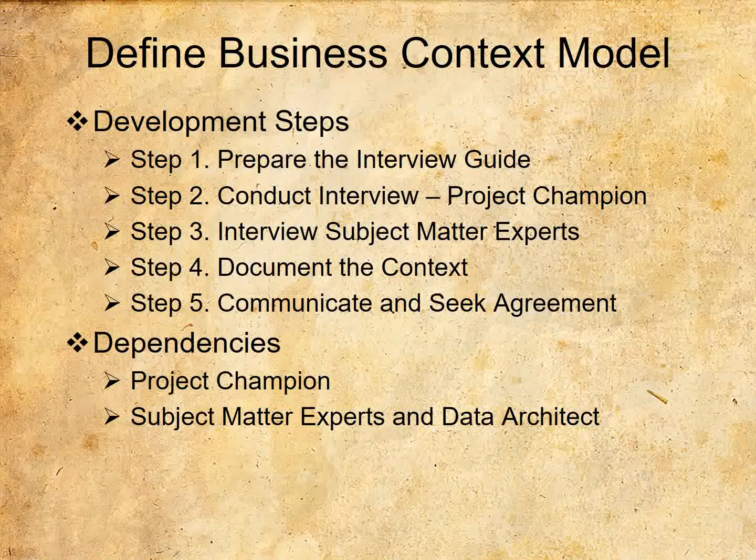Interview subject matter experts. Complete data collection for the systems and data inputs and outputs by interviewing the data architect. Also, complete interviews with subject matter experts to clarify and confirm the context diagram. Document the context. Use the template to document all the elements of the context diagram. Ensure you are clear on the linkages and direction of influences. If not, place a call to the subject matter experts to clarify.